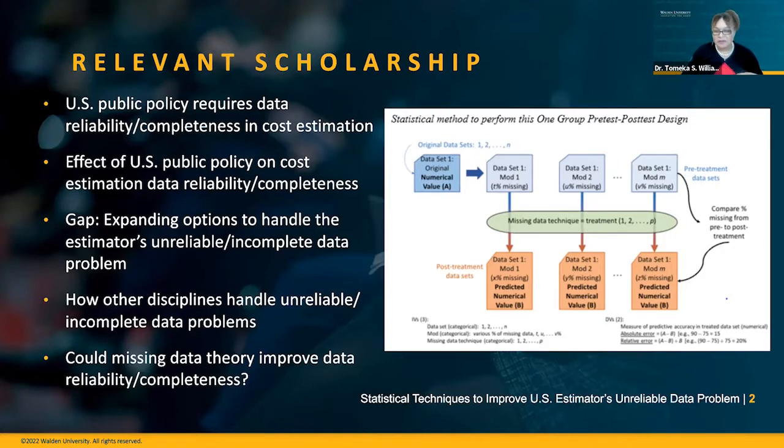software line of code, like, what's that number? I'm going to take that subject, remove it from the data set, create an artificial missing data problem, and then use all the statistical techniques that I chose to try to fill in the holes. And then let's see how well that imputation could fulfill that missing data problem. Like, how close could it get to being as accurate as the known, or what I call the predicted, the original data value.